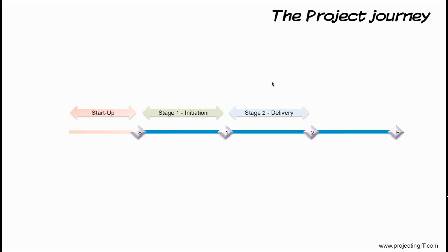The project manager will plan each management stage, get the plan approved by the project board, get the work done by the teams, and keep the project board informed. When all the work of the stage is completed, the project manager will get the project board to review and assess the status of the project. The project board will check the business case and whether the project continues to remain justified. The project board will also approve the plan for the next stage.